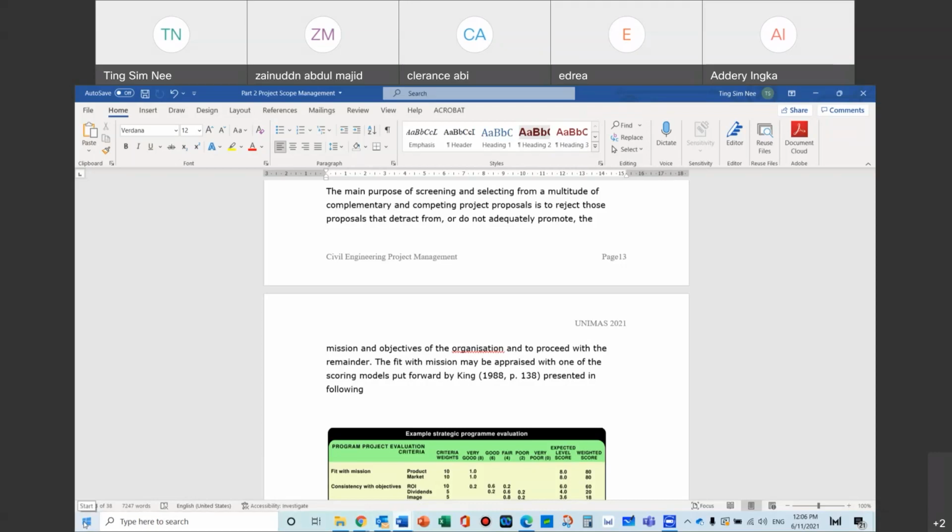So after you've answered these two questions, there's a third question that you actually need to answer, and that is whether the project is worth it or not. And this technique that we always use is what we call life cycle costing. For the project, you need to study how big the maintenance is. Would there be too much maintenance needed for that? But I don't want to bring in project life cycle so early at this point in time, because if I bring it in so early, we don't have enough data to actually study project life cycle at this point in time. So you answer the questions of viable and feasible first.